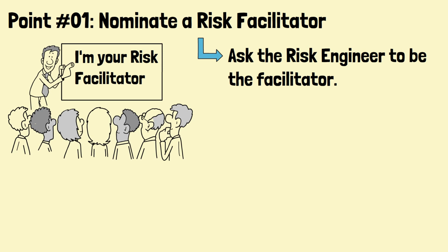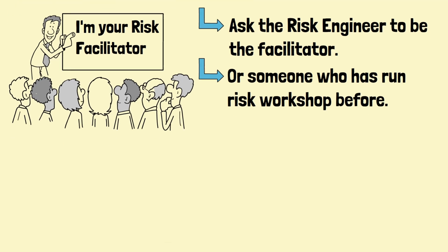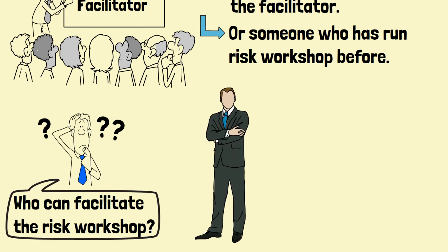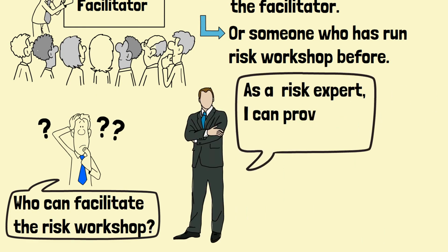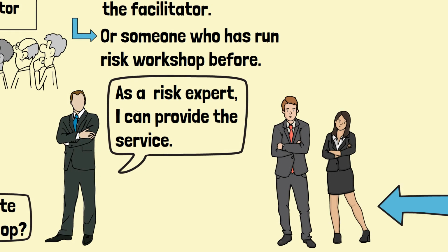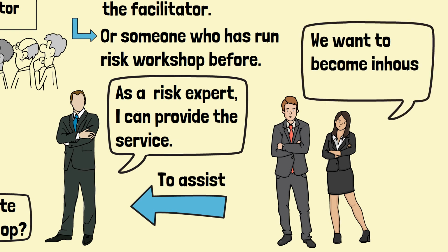However, in many organizations, risk facilitator is not a full-time job. It is essential to nominate someone who has run a risk workshop before. If there is no suitable candidate within the organization, it can be outsourced to a risk consultant. Then, get 1 or 2 persons from the team to assist the risk expert in the risk workshop. This will help build up the in-house expertise.